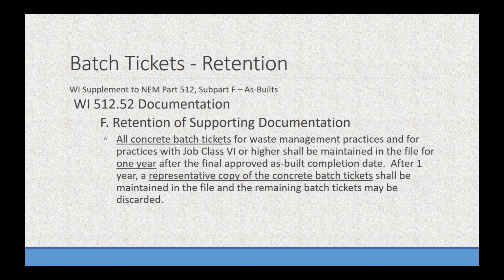So all batch tickets 1 year. Waste management practices or job class 6 or higher. After 1 year, a representative copy of batch tickets shall be maintained in the file, and the remaining batch tickets shall be discarded.